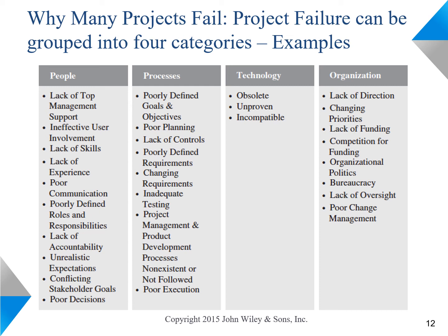This is a big deal, meaning that if an IT project doesn't have a strong sponsorship by the leadership in the organization, it is very likely that it would fail. Similarly, if the end users are not involved in the planning and rolling out of the project, again, that can be a big contributing factor.